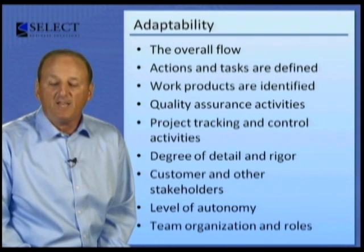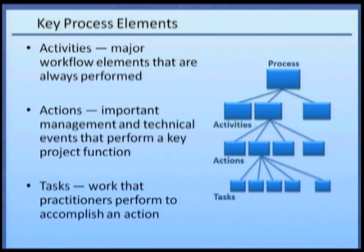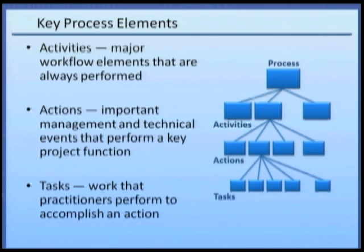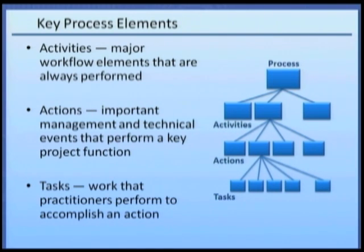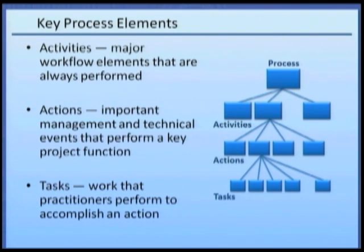The adaptation that occurs happens within a hierarchy of key work elements that are part of the software process. At the top of the hierarchy is the process itself, which is composed of a number of activities, sometimes referred to as framework activities. These activities are major workflow elements that are always performed for every project. The activities themselves are composed of actions — important management and technical events that perform a key software engineering function. Finally, each action is composed of a set of software engineering work tasks, which are performed by practitioners and achieve some small part of the overall project flow.